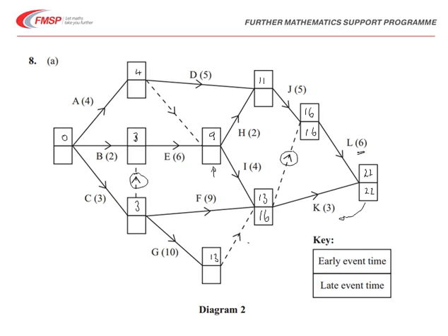So the latest time we could start this, get to this point here, is 16, because we've got to go to that dummy activity to get to the 16 bus. So be very careful with these dummy activities, they can make a big difference. But working back in a similar way, we find that each of these is as follows: 9 there at the top, the one at the bottom here is 16, again because of that dummy activity going in there, and then working up here, these become 3.